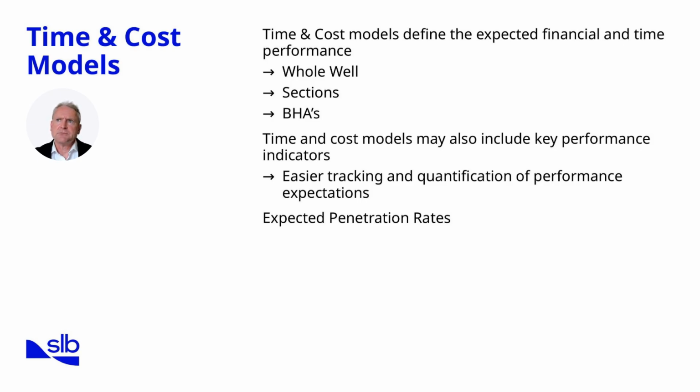The advantage of these models is twofold. First, they give us a baseline expectation, and second, they make performance tracking straightforward. When deviations occur, they can be flagged early for corrective action. Time and cost models set the stage for accountability and continuous performance improvement. Next, we'll look specifically at how these models are used in the design phase to justify and structure the well plan.